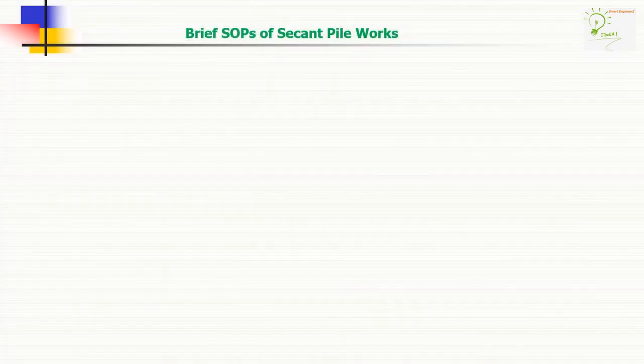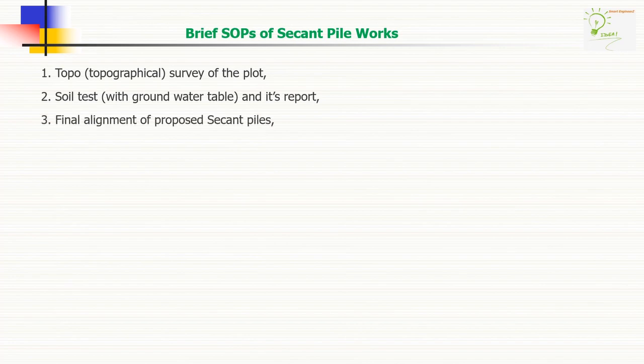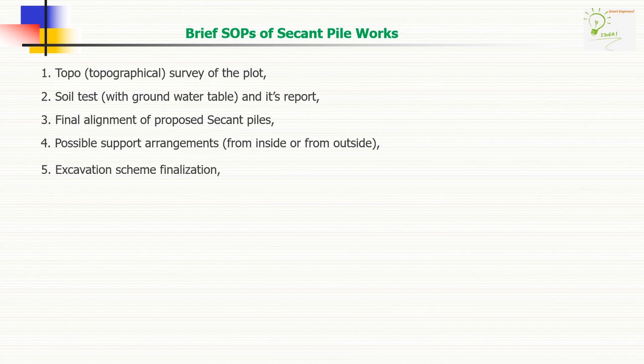Brief SOPs, that is standard operating procedures of secant pile works. Topo survey of the plot, soil test and its report, final alignment of proposed secant piles, possible support arrangements, excavation scheme finalization,